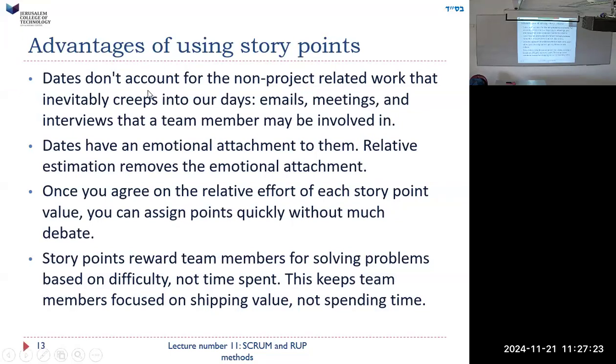Advantages of using story points. Dates don't account for non-project related work that only creeps in as delays: emails, meetings. In other words, when I come up with a certain amount of time, I'm thinking in terms of net programming, when I just sit in front of a computer. But I may have a sick day, I may have a meeting, and those may affect all types of things. Therefore, I have to judge these relative to other things. Everybody in the team is going to go to a meeting, so that will affect all of the projects. So everything's just relative to the other stories.